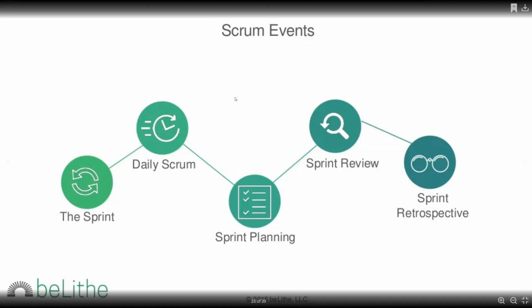So we say, okay, John, I can take on 25 user stories and be done in the next 2 weeks. Adam will take maybe 30. So everyone divvies it up. But hey, this story, we thought it was a medium, but it's actually extra large. So we have to break it down. Or, this one is too big, we have to break it down into small pieces and address that. So those are things that are done during the planning.